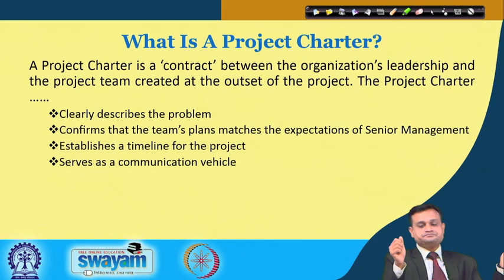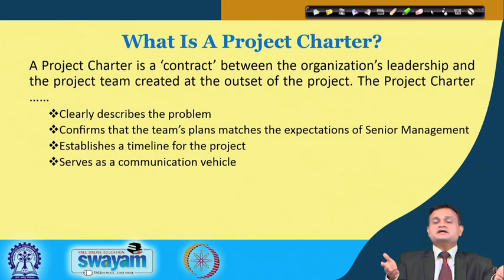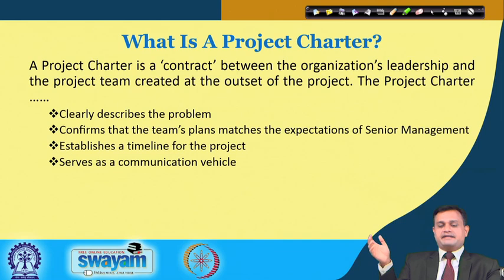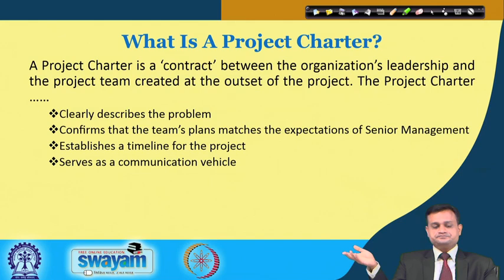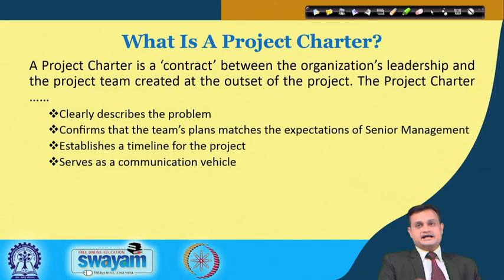The project charter typically defines the problem scope and boundary clearly, so that tomorrow there is no dissatisfaction or conflict between top management and team members about the deliverables and scope of the project. It confirms that the team's plans match the expectations of senior management, establishes a timeline, and serves as a communication vehicle — so whenever they have to report performance achievements at different milestones, they can use this as a reference to report to top management as well as within the team.